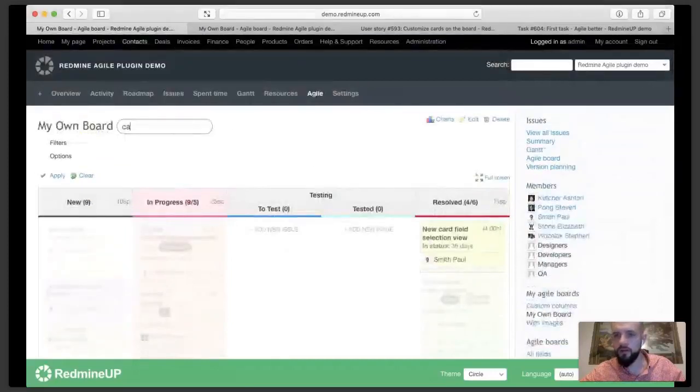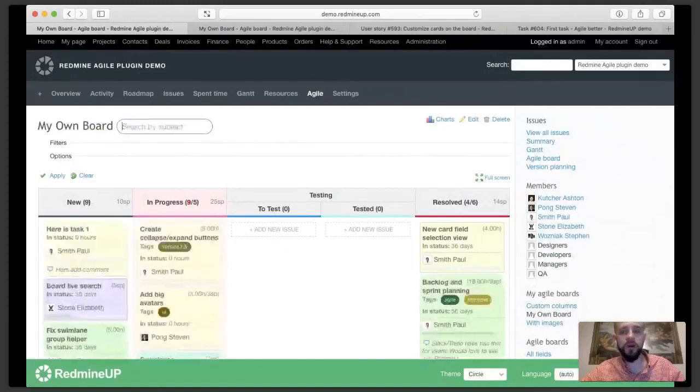Gutenberg, regarding your question, if you want to have evolution metrics for all your projects, could you maybe specify what you mean by evolution metrics? If you want to see the progress in all of your projects, you can achieve this by creating one parent project and having the others as sub projects. Because for the main project, you can have a chart that would also include the data from sub projects if you use such a setting.